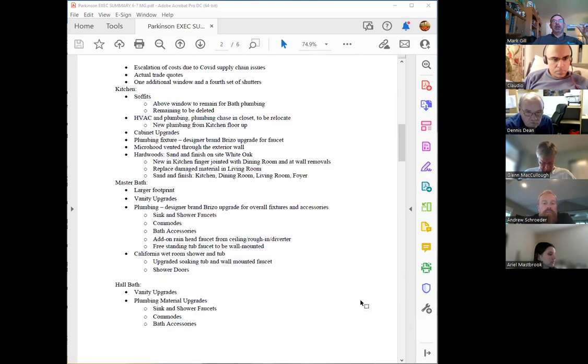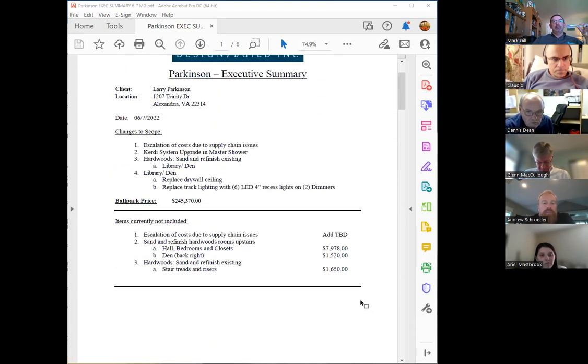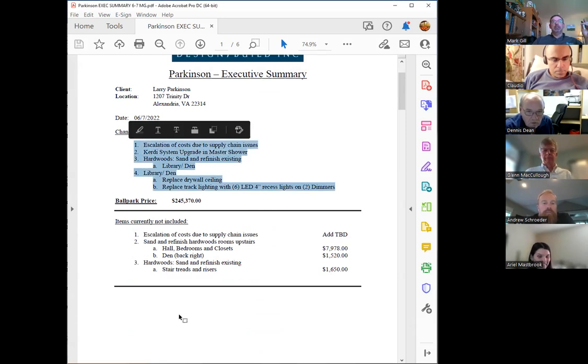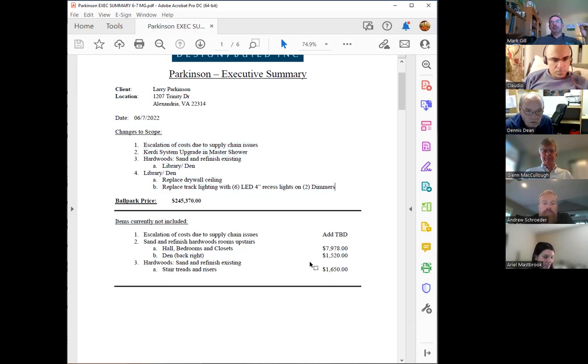We made those live and on the spot, and then we did one more round of updates, which was literally the decisions he chose to add to the contract. He did not take anything out. And so when he got to contract, he saw I went from 238 to 245, and the reason is I picked up these 3 options. So it's really easy for him to then review the contract and sign off.